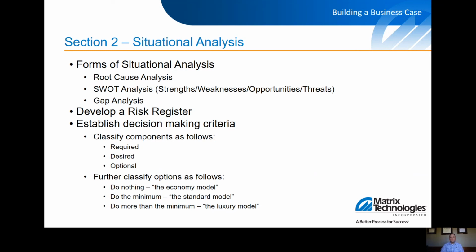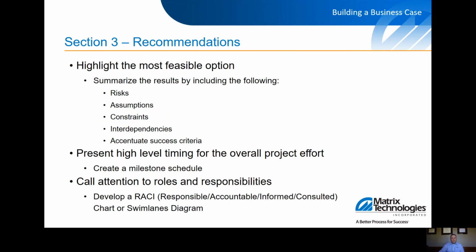Further classify these options as doing nothing, doing the minimum, or going beyond the minimum to address the problem. This can be simply equated to evaluating a vehicle purchase relative to an economy class, a standard class, or luxury class.